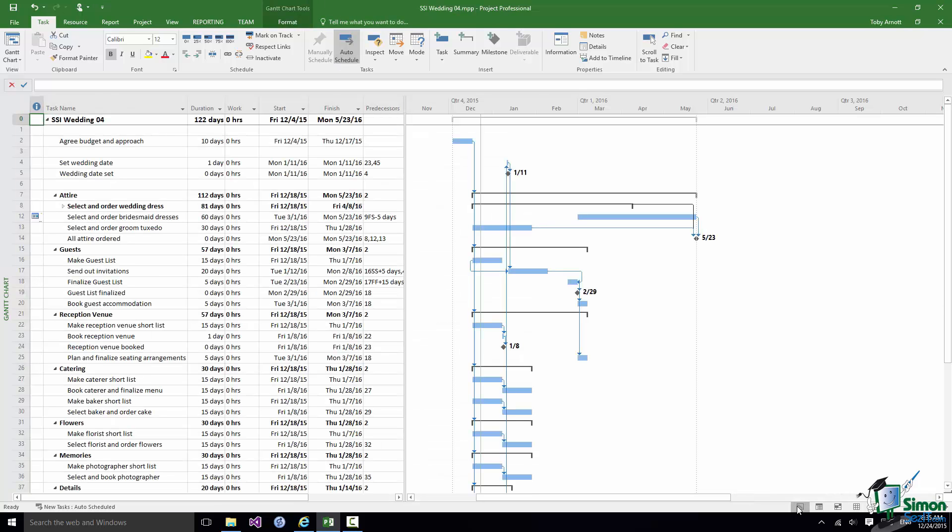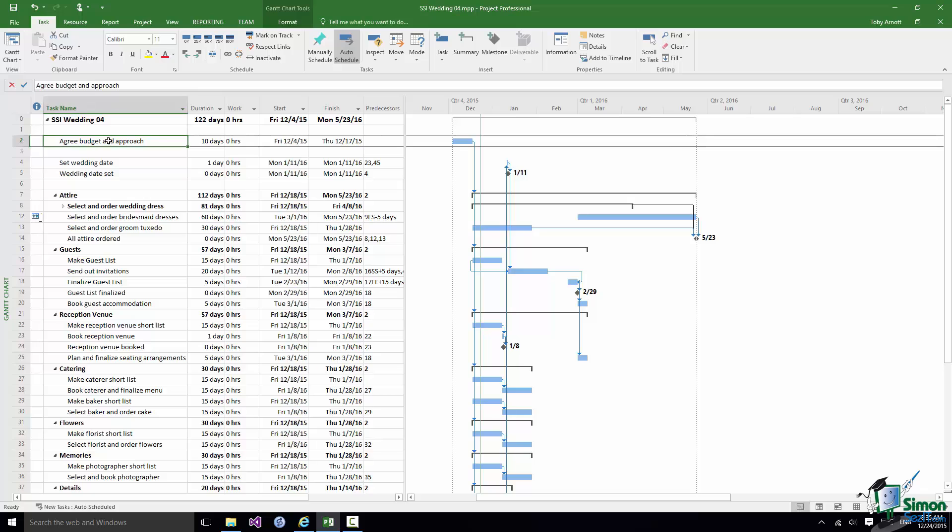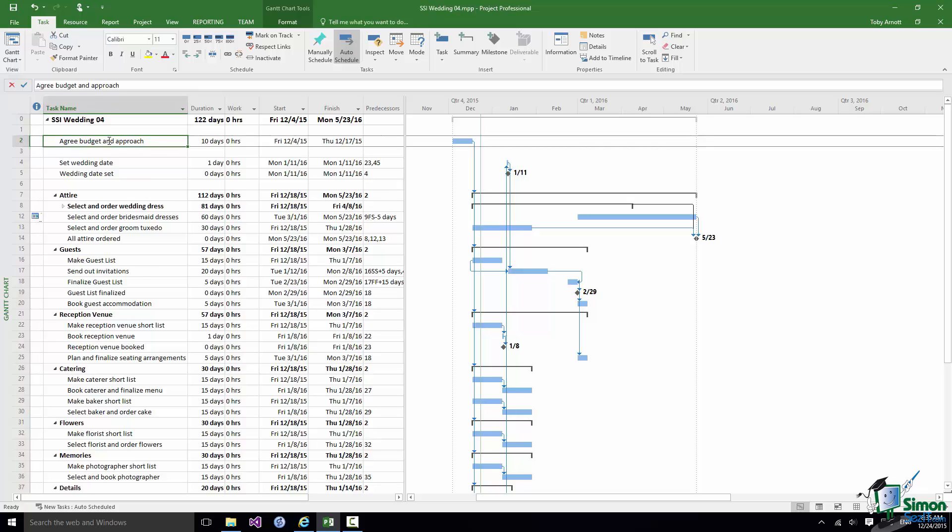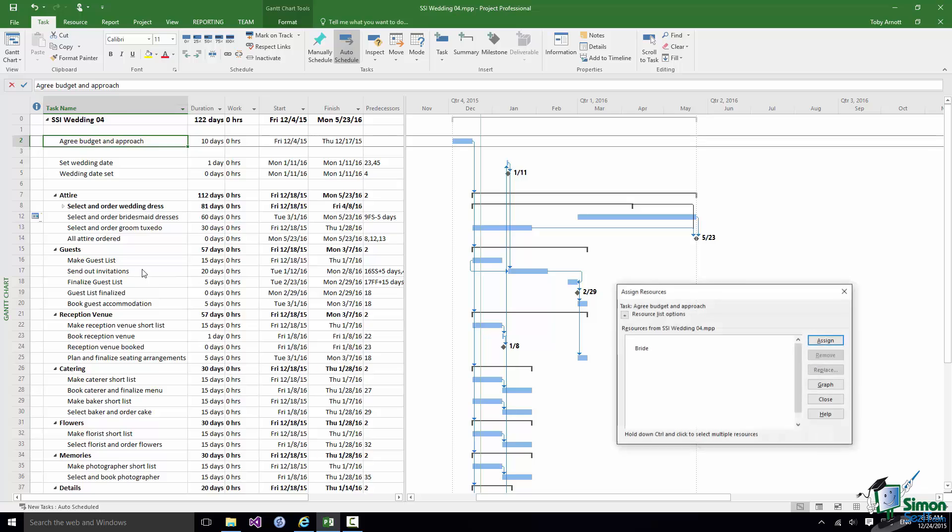I'm going to choose one of the tasks and assign resources to it. Select Agree Budget and Approach, right click, and click Assign Resources.